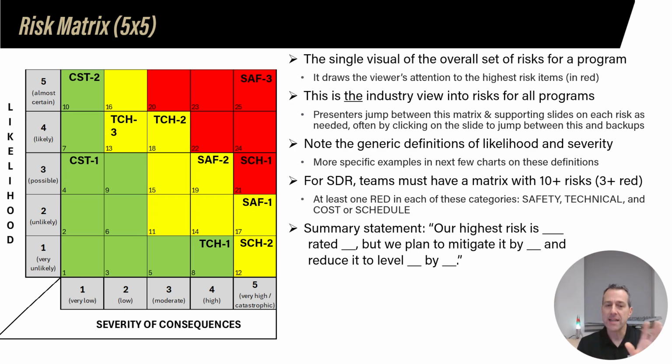The scoring is a notional scoring. Some programs, and you are welcome to do this as well, will just do a multiplier. 4 times 4 is 16, so where it says 22 right now would be a score of 16. 5x5 is 25, and on down.